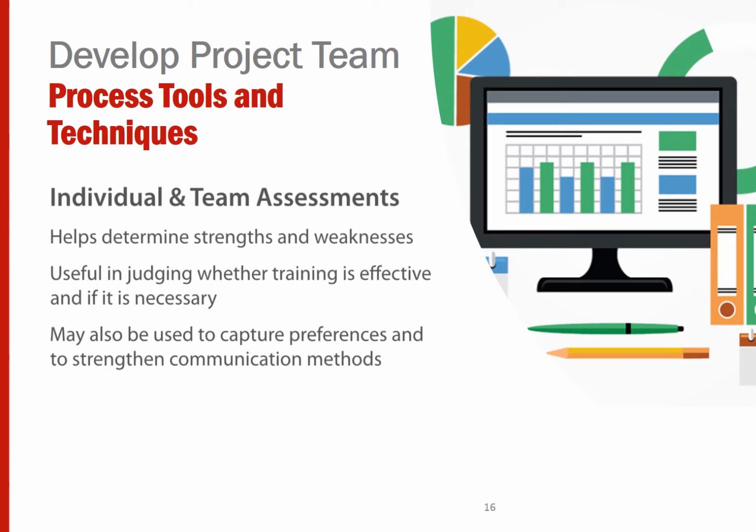Individuals and team assessments. It's also important to establish the right assessment framework for the individuals and the team. It helps determine strengths and weaknesses. You look at three areas: things that worked really well, things that didn't go well, as well as things that the team or the individuals may continue doing. Useful in judging whether the training is effective and necessary.